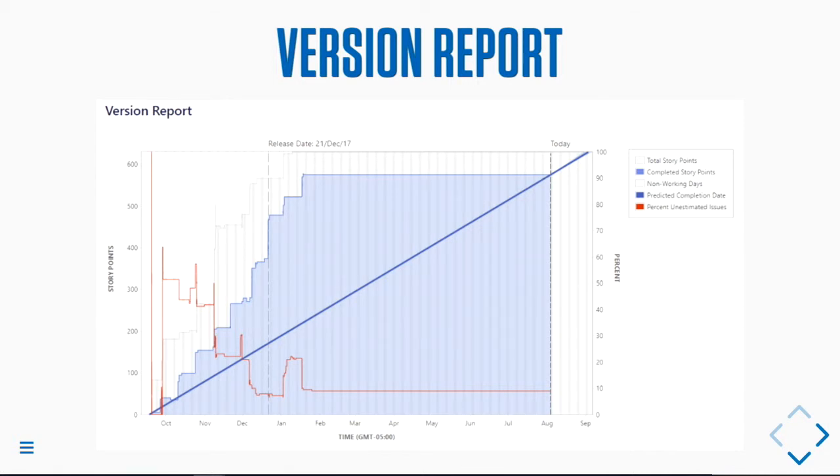I wish that I had one that wasn't completed, but you can see that blue line follows up from, okay, this has been a long time ago. So we were burning up our completed points from October to January, so that's the blue stacking that's increasing. And then I think we cut the project, and that's why it kept drawing out. And then you can't see the width of the lines above and below, but the guidelines would show you, based on your current velocity over time, when you are going to finish this stack of work that you've added to the release.